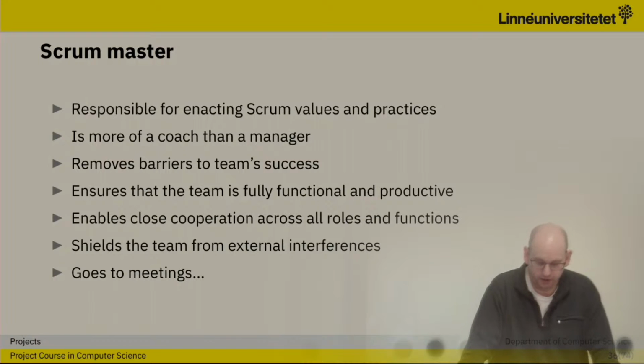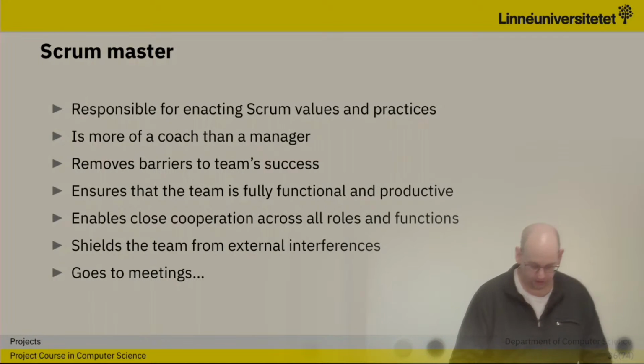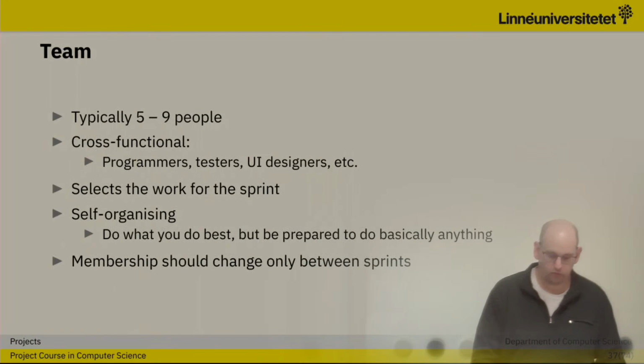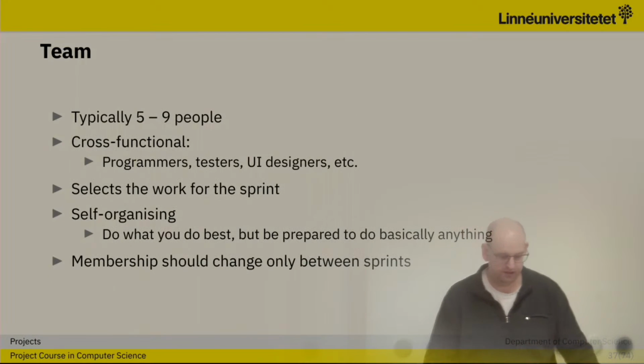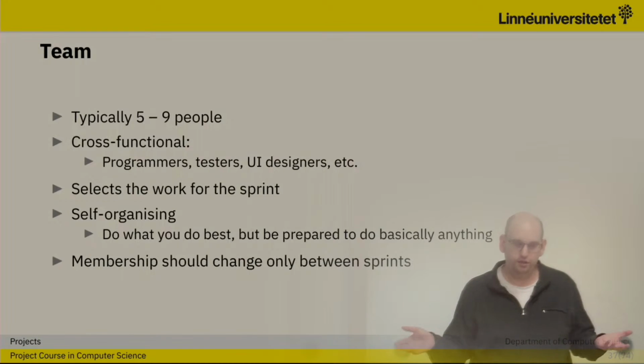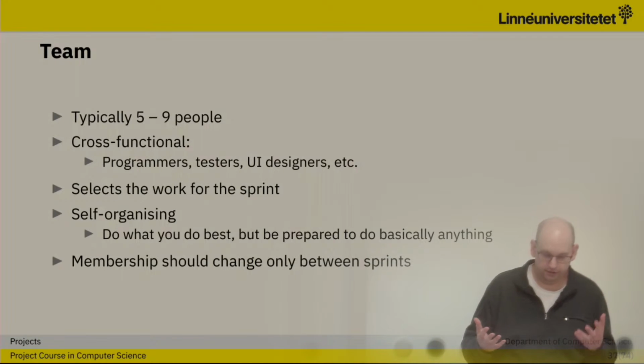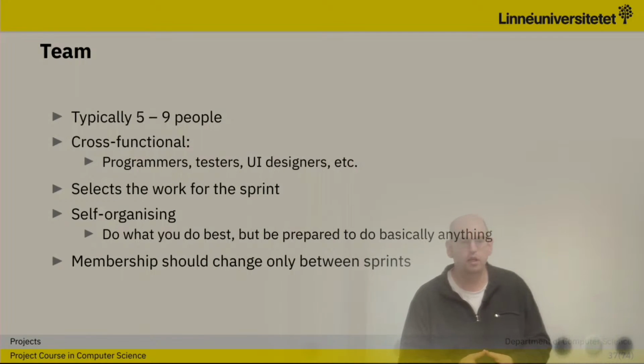Shields the team from external interference, as I said previously, and also the boring thing, go to meetings. And that's part of shielding the team off from all the other things. The team itself is somewhere around 5 to 9 people. We can have larger and we can have smaller groups, but if we position ourselves around 5 to 9 people,